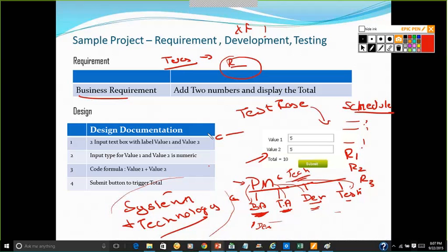So once the stakeholder approves and I get the budget, say for example I get a 1 million budget, my responsibility is to justify why I need 1 million. Because I need, say, 40 days to get this completed. So 40 days with X number of resources, this many hours per resource, gives me a total calculation, and that is what I would have projected. Now my responsibility is to complete it within those 40 days.